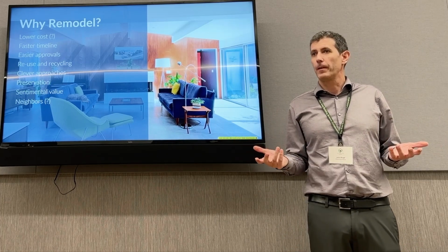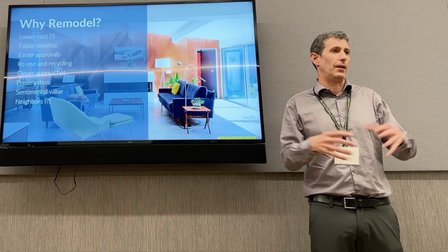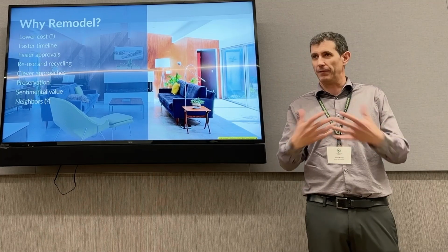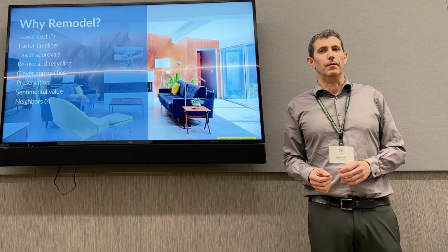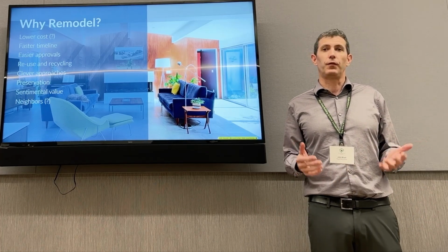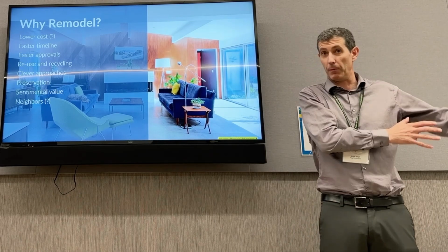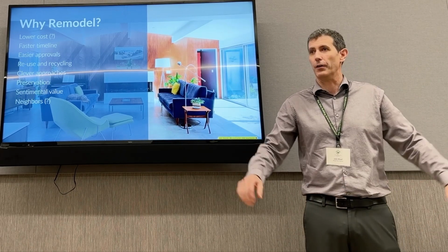And why is that? Well, because even if you strip the house down to studs, if you have the roof in place, you've got the walls in place, you've got the foundation in place, you've jumped ahead in construction a lot of dollars and a lot of months from starting from a dirt site.